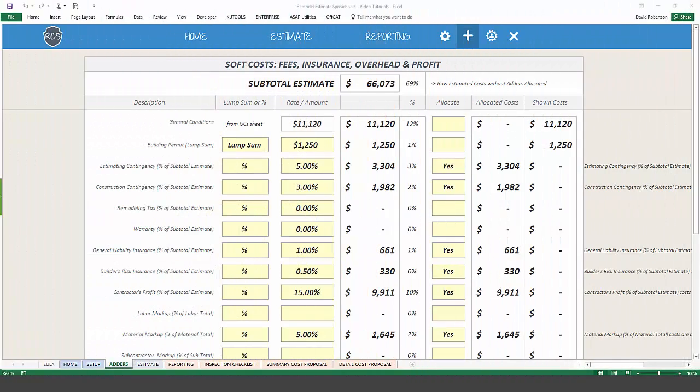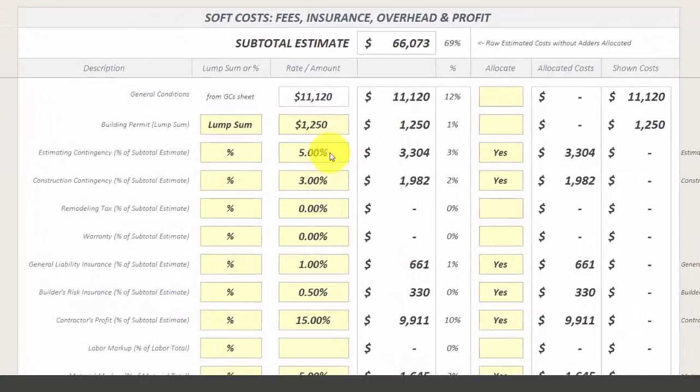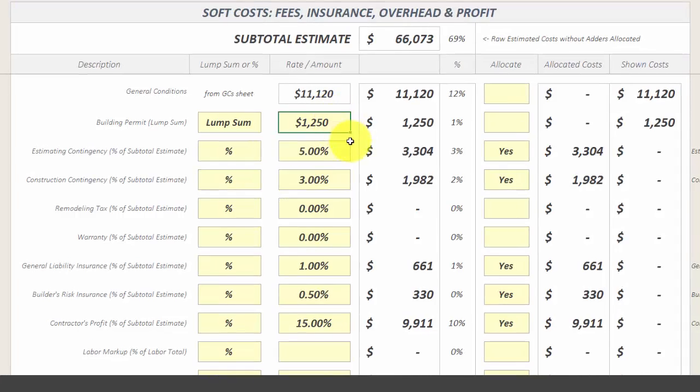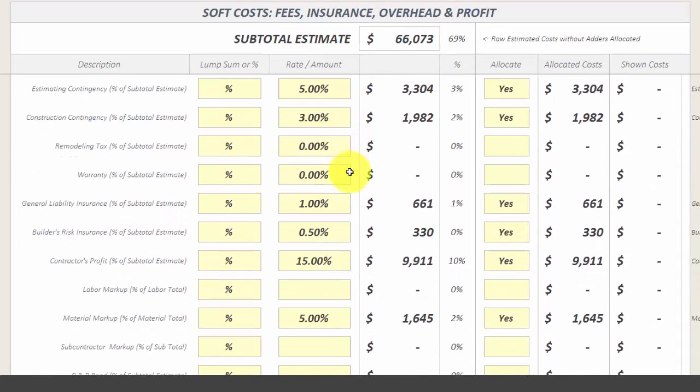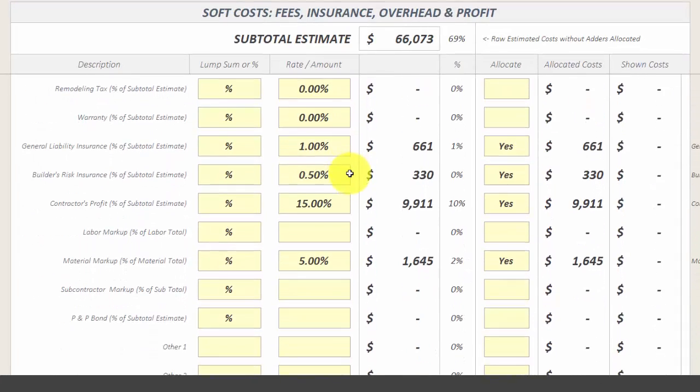Our Adders module allows you to build project soft costs into your project estimate, such as building permits, contingencies, insurance, markup, and profit.